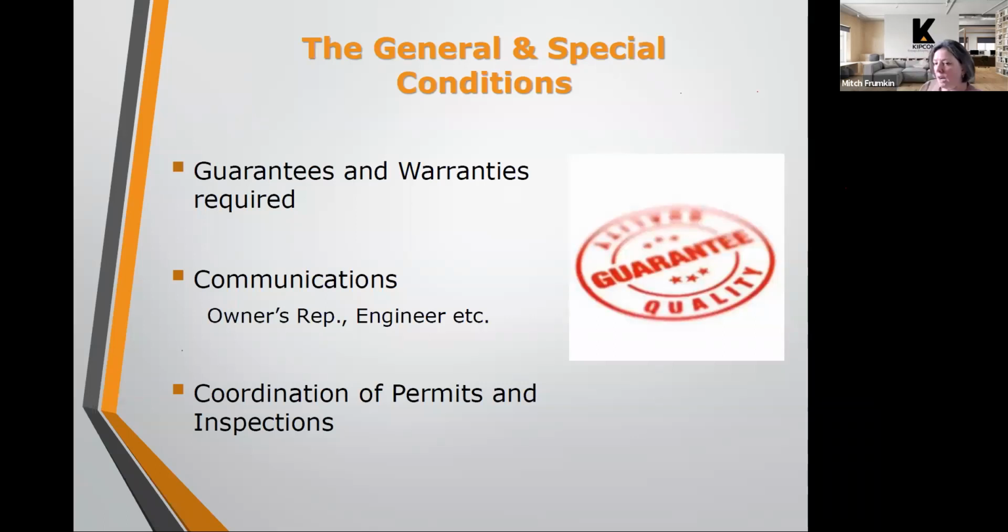Yeah, so it's always advisable to have specifications prepared, and you'll see in the next couple of slides that it keeps the comparison between contractors comparable across the board. You're not getting 4 different contractor bids on something that may all have different scopes of work. So when you're getting into larger projects that have a lot of moving parts, or a lot of different steps in the construction sequence, it's always advisable to have a detailed spec prepared.